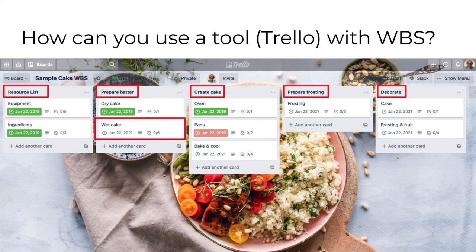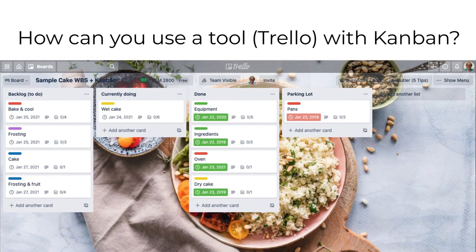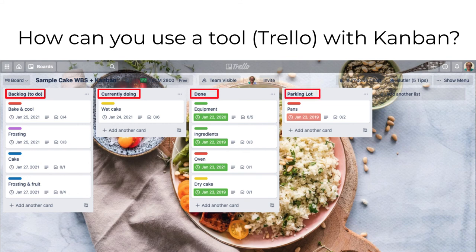Cards with dates in green are complete; the one in red is overdue. Trello can also be used as a true Kanban board, where each swim lane represents a task status: Backlog is the to-do list, there's 'Currently Doing,' 'Done,' and a 'Parking Lot' for problems or issues. Each card represents a separate task with details when expanded. The colors show which ones are completed, on time, or overdue. Microsoft Teams' Planner — now renamed Tasks — appears capable of handling both WBS and Kanban type project information in much the same way as Trello.